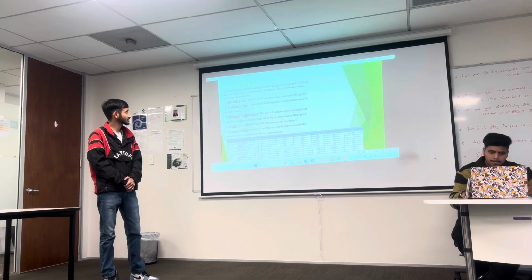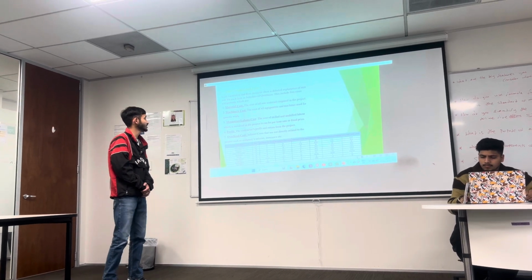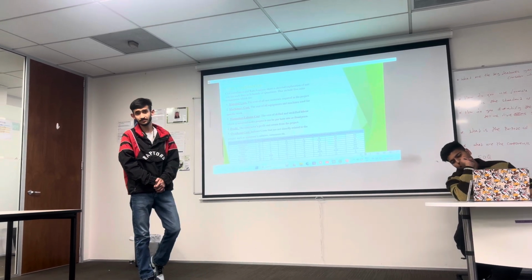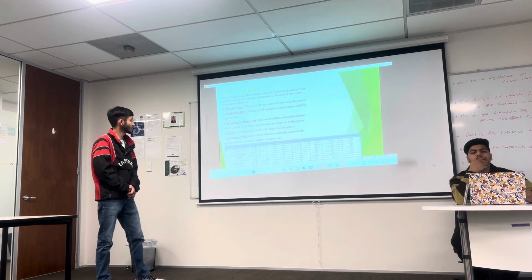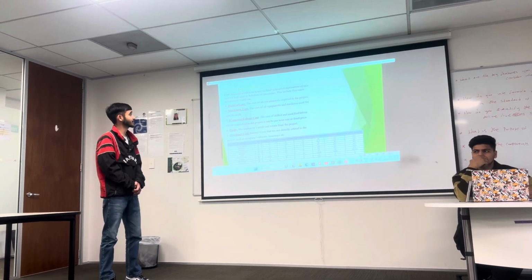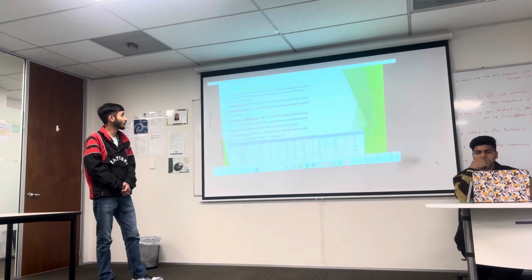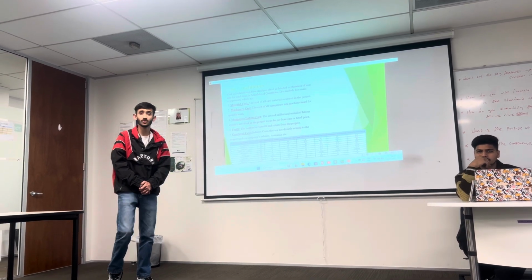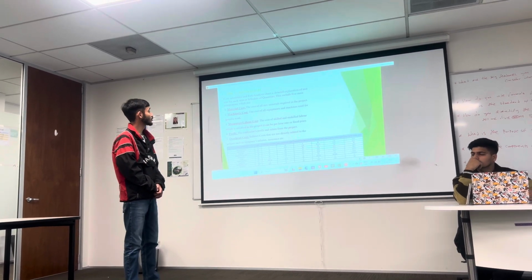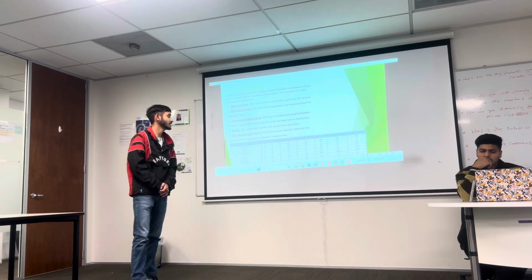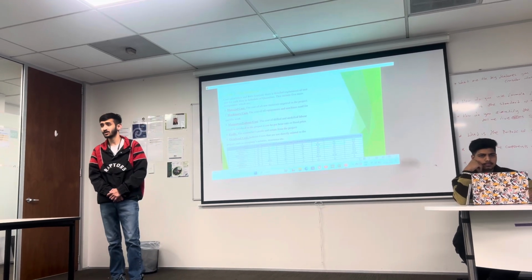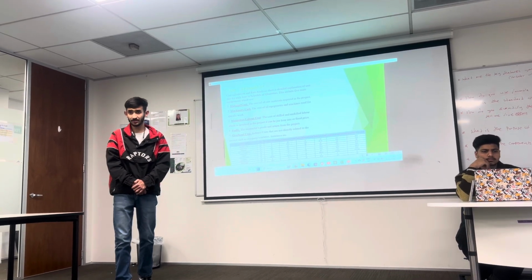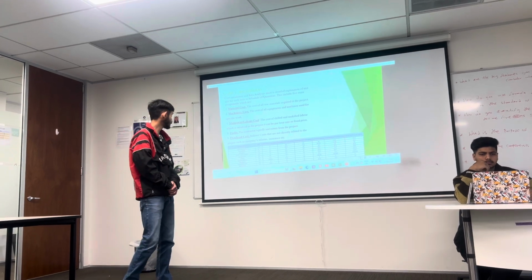Then we have the cost calculations. Cost calculation is also a main part of the SOQ. The cost calculation and rate analysis sheet is a detailed explanation of any unit rate for an item in a schedule of quantity. This includes five main components, which are material cost, machinery cost, labor cost, profit and the overhead cost.